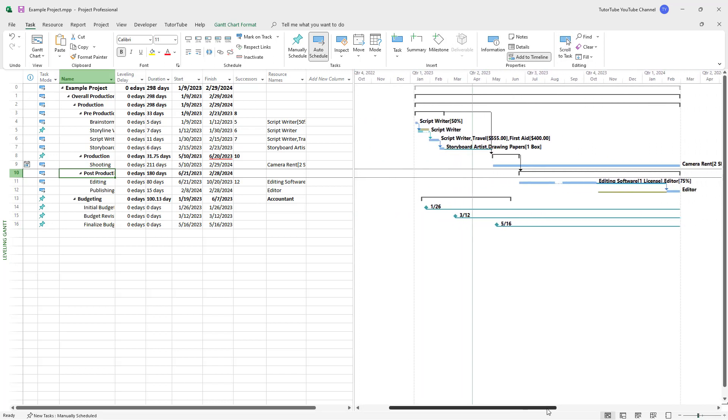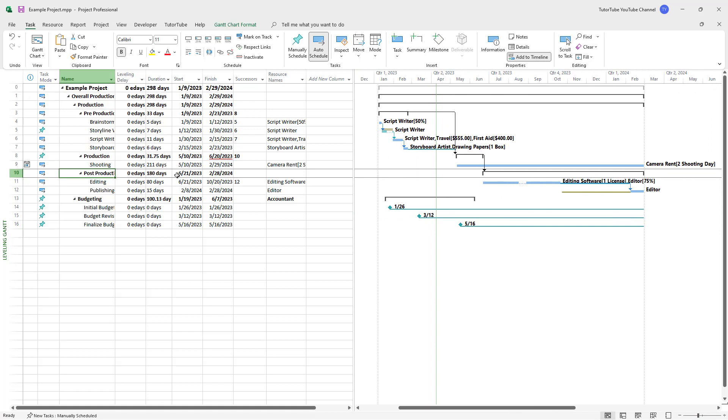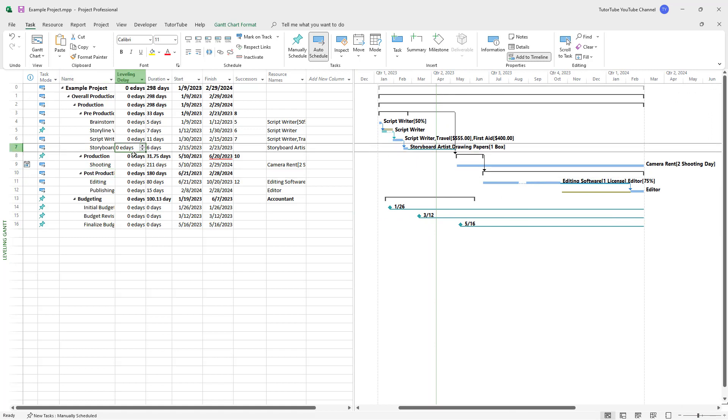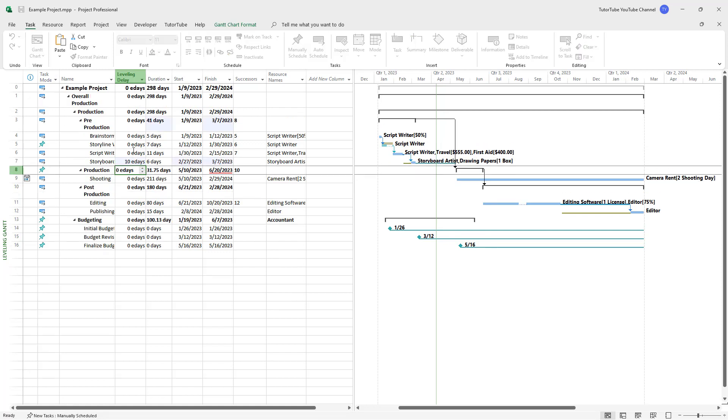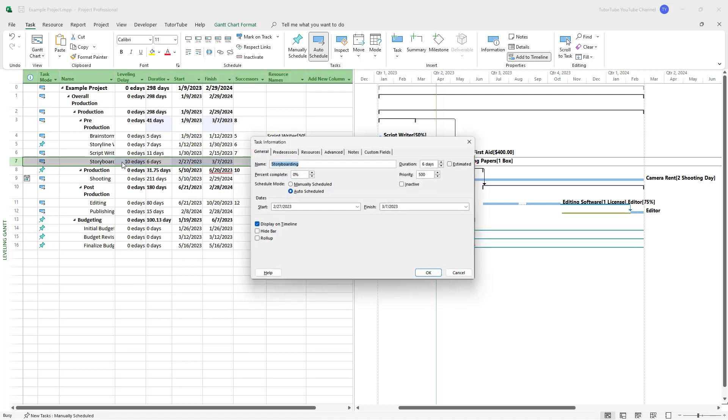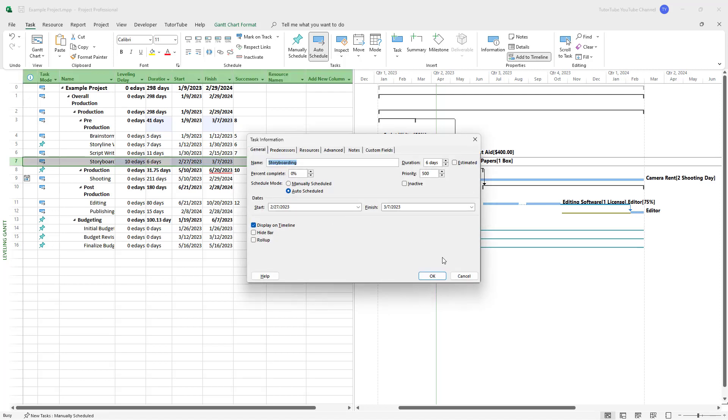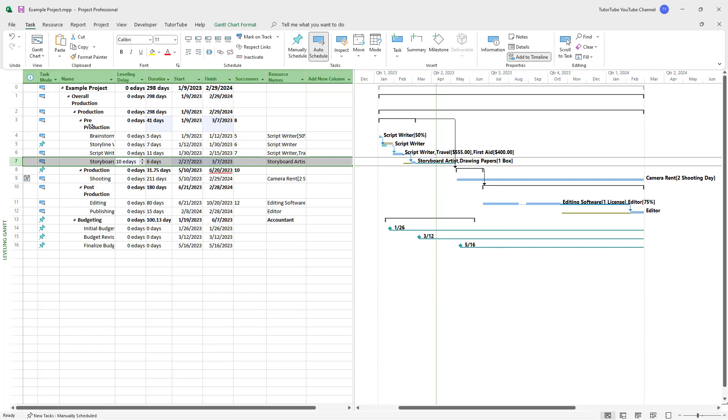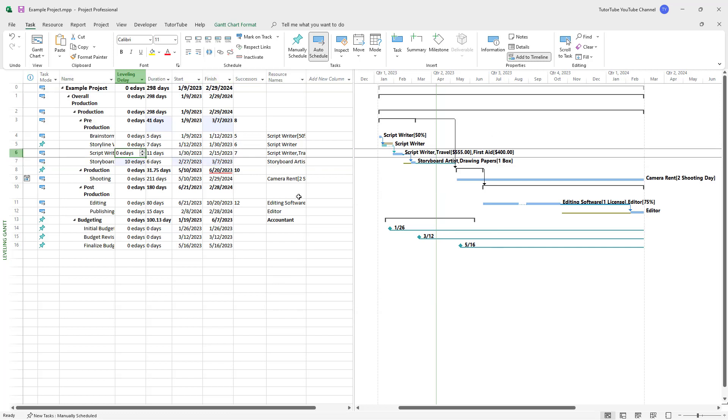If you want to rearrange the time, you can add E days. For example, if I add 10 E days to the storyboard, you can see the leveling delay is added, meaning the actual task will start later.